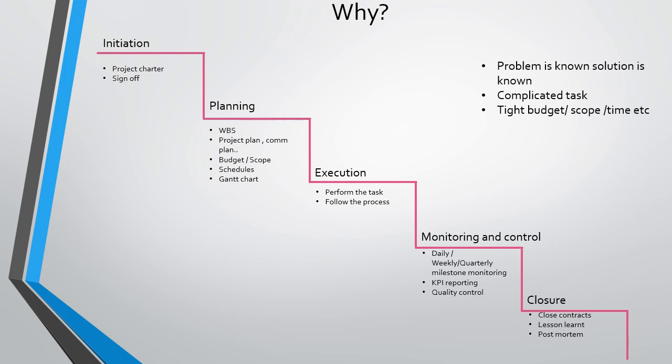When we initiate the project, basically what we do, we prepare a project charter. So we first identify a problem statement, right? And then we try to create a solution around that and show that solution to our management or our customer and tell them that this is how the solution is going to work, this is how you are going to get the benefit, right? So first you prepare a project charter. In that you take a sign off, identify all the stakeholders, and all those things you do, right?